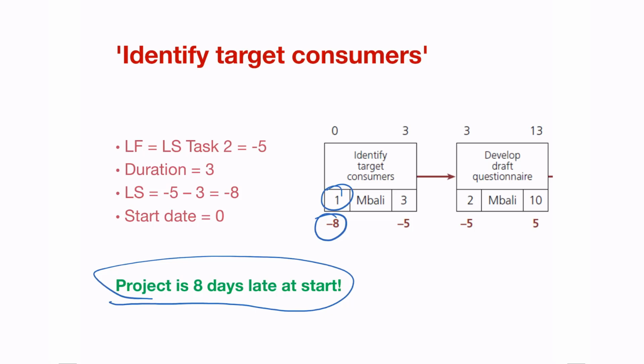But now we know, in terms of all the activities that we need to complete, that 130 days is not realistic for this entire project to be completed. Alternatively, we have to look into the different elements of the project and look at where we can reduce certain activity times in order to get to the 130 days that the client wants us to complete the project in.